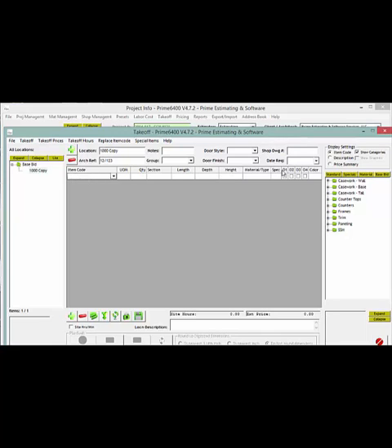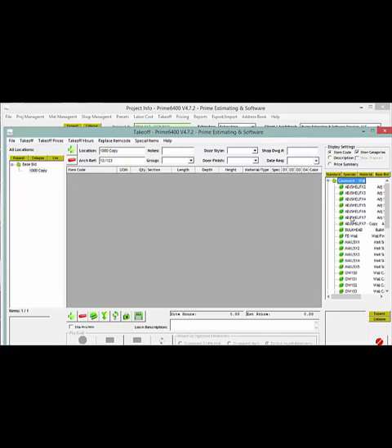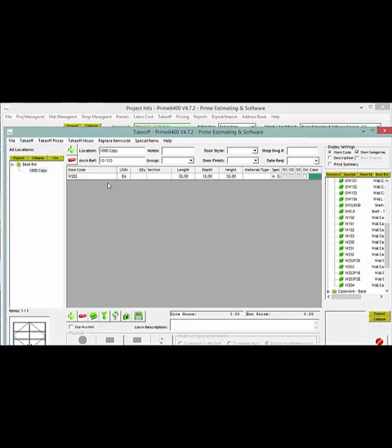Now very simply, we can come over and look at our standard items, and let's say that we've got a wall cabinet, two-door wall cabinet. We can drop and drag that in. We can come over and fill in the quantity looking at the drawing. We can put in a section, and we can update the dimensions from our default settings for the dimensions themselves. We have another viewport where we can look at the takeoff with pricing. It's got our hours unit of install extended, our manufactured unit, and extended for the manufacture portion. And we would continue to do this.